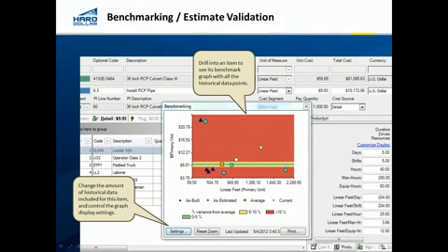From a benchmarking perspective, when we do look at that history, and this is one of the newer features in Hard Dollar, we can drill into an item to see its historical points. We can see that item at the very, very detailed level for one activity and those resources behind it: what has been the as-built history of that particular activity? What is the as-estimated projection for that activity? What's the average, and what is the current performance of that activity?